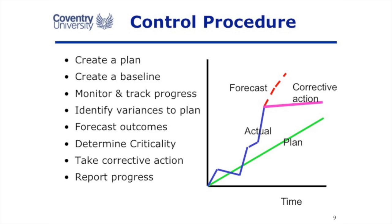When we've completed planning, we need to create a project baseline. We plan the project — this is what we think is going to happen — and it's an iterative process where our plan gets more and more refined. Eventually we say this is as close as I'm going to get to a good plan, and we copy all of it into a baseline. A baseline is a copy of the estimates: estimates of work, estimates of cost, estimates of duration. We copy those into a baseline and then enter the actual values. Things won't go exactly as planned — some things will be early, some late, some will cancel each other out — and you can compare what's actually happening with the baseline.